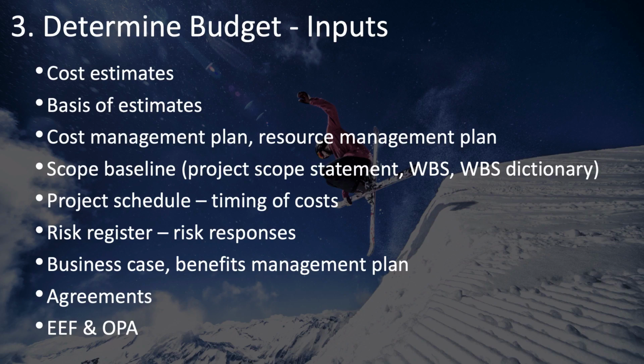Your project schedule is also important when it comes to coming up with your funding requirements, which is your time-phased budget. Your schedule will allow you to put the costs in the proper months or quarters or other time boxes that let you put together this time-phased funding requirements document. Your risk register will also have information about risk responses that have costs associated with them.